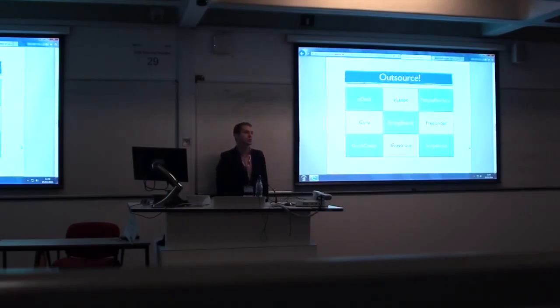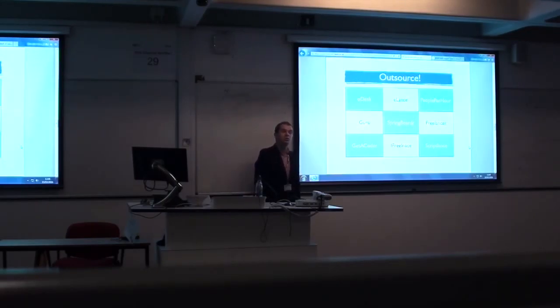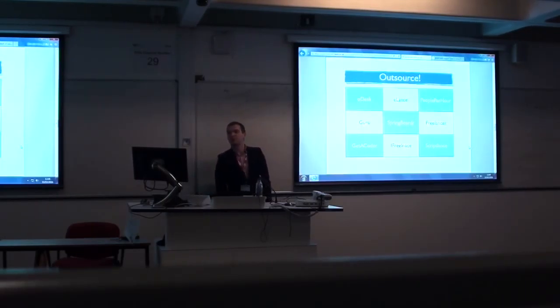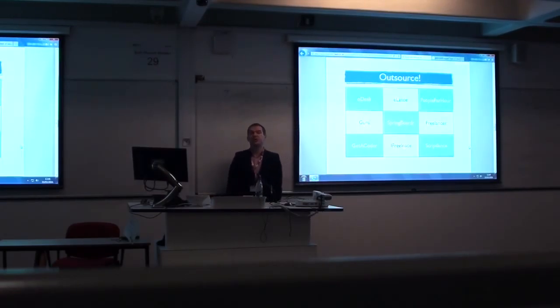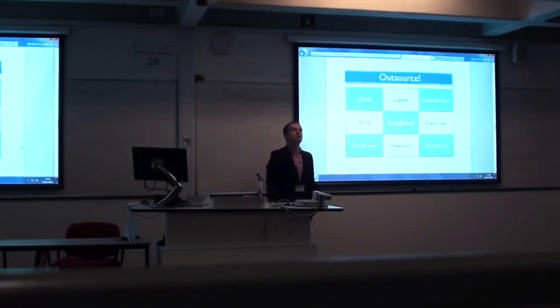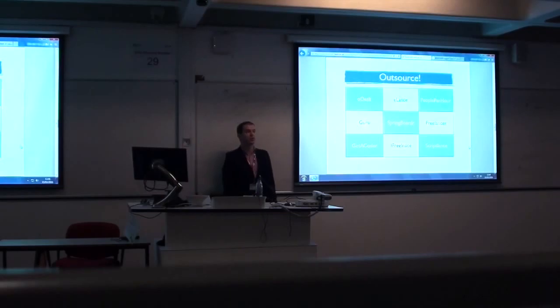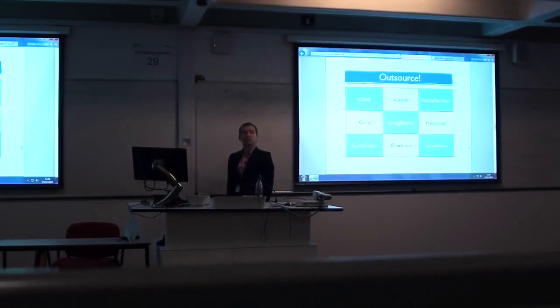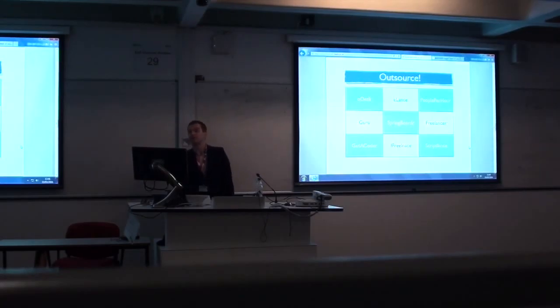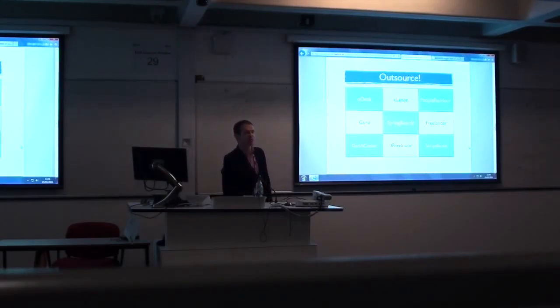And the way it works is that you write up the brief of what needs doing, you put the brief up on the platform, and then all those developers and designers around the world will pitch you for work, and they will give you a breakdown of cost for the work to be done, and you decide which supplier, which agency or team, you decide to go with. It's quite interesting. If you've never done anything, try it out. Even something very, very small, try it out.